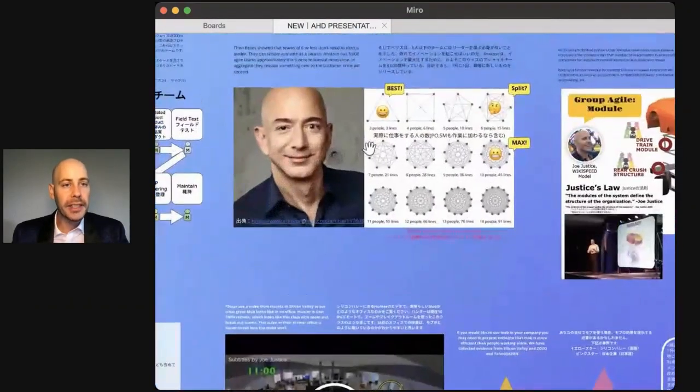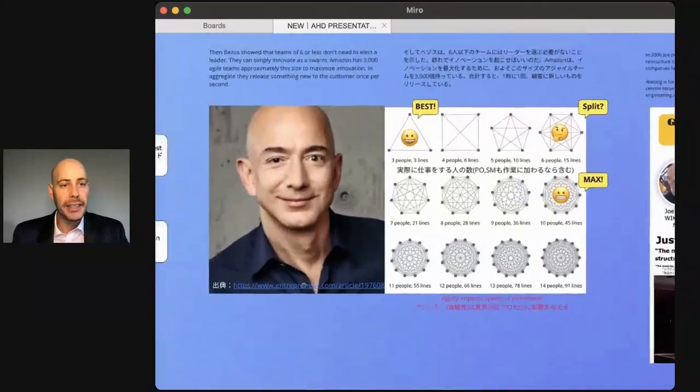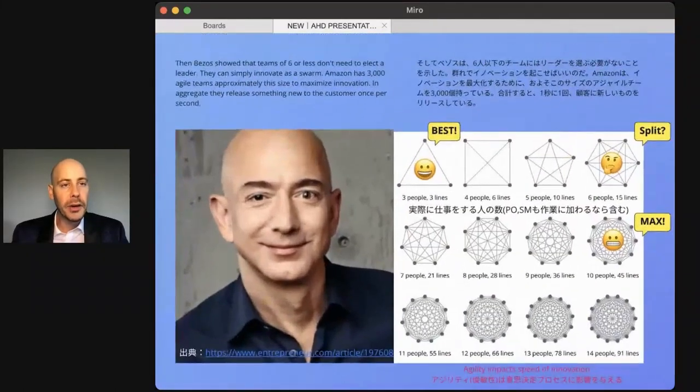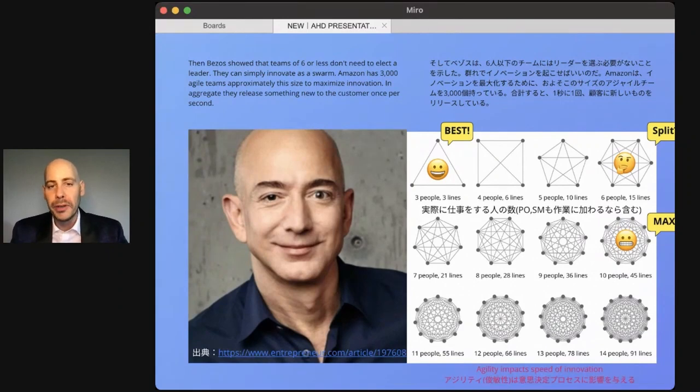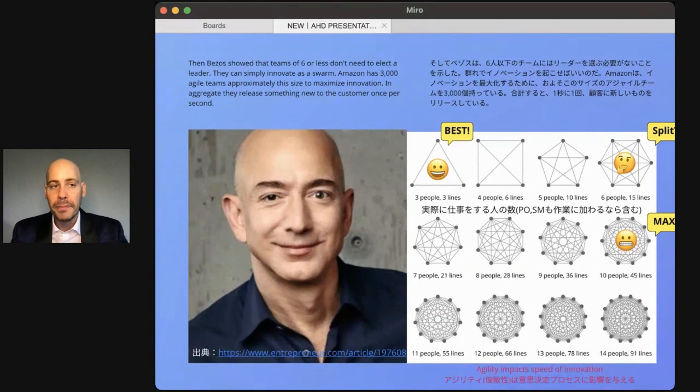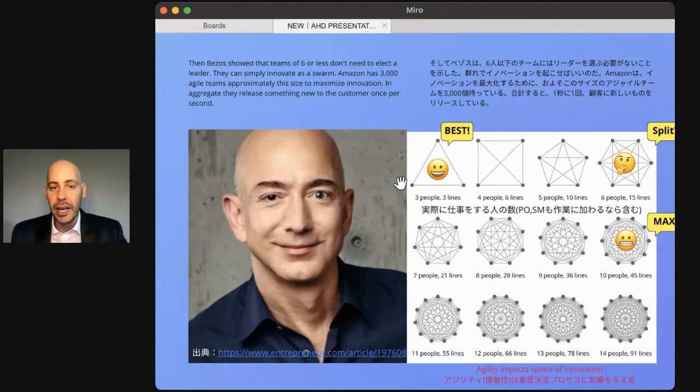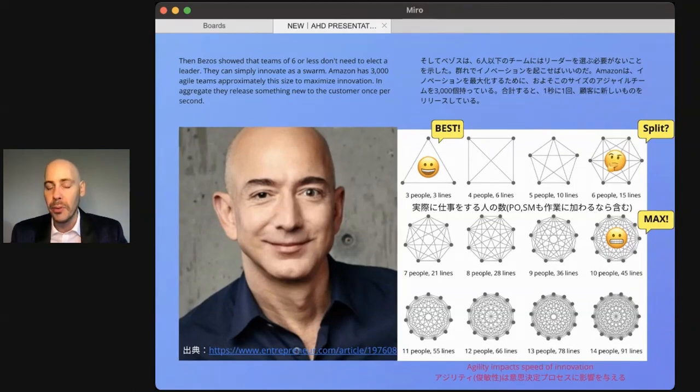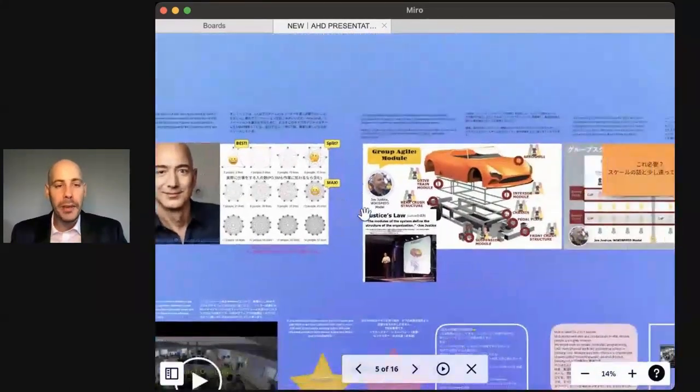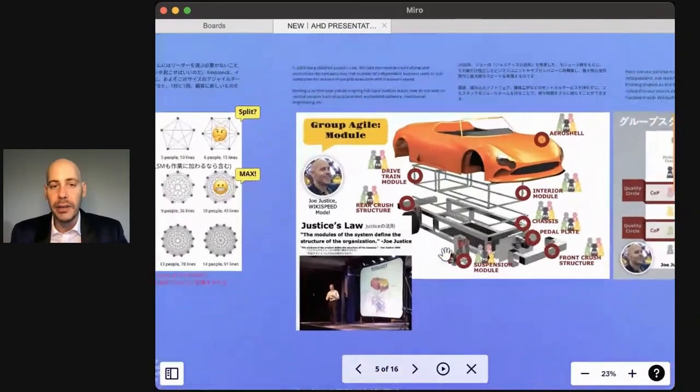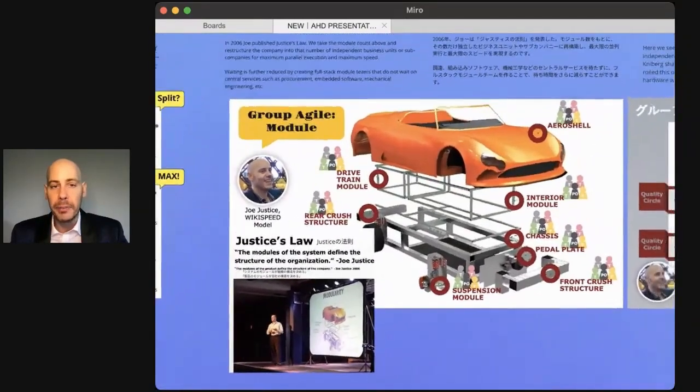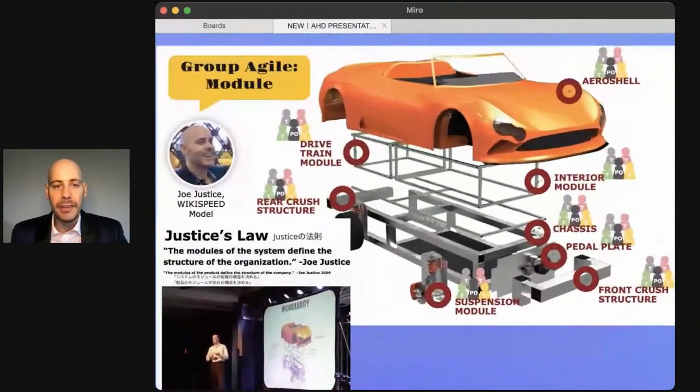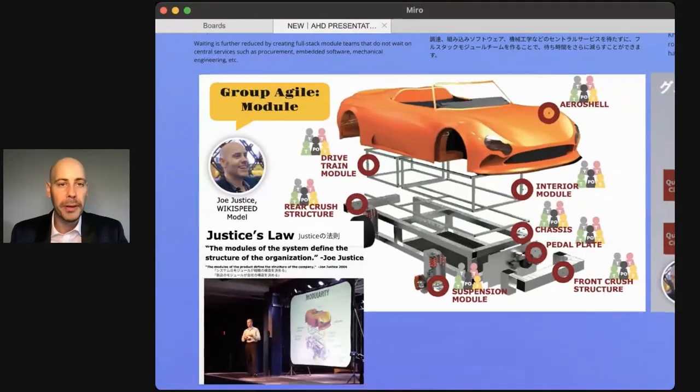And this makes the teams really fast. Jeff Bezos insisted on teams of five people or less. Jeff Bezos noticed that teams of six people or more almost always chose to elect a leader and that slowed the team down. They would wait on the leader to make decisions. So Jeff Bezos insisted the teams would be five people or less. That allowed them to innovate quickly in a flat structure without paying a separate leader. This is also true in Tesla. The mobs are often starting with 50 or even more people, and then they split, they self split into five people or less, or sometimes pairs, two people.